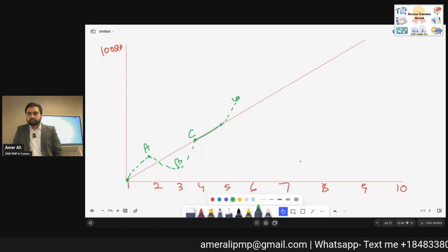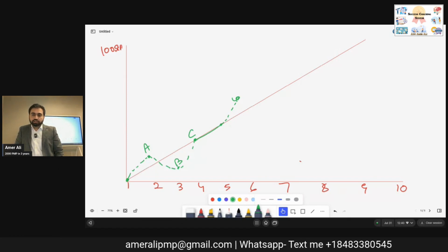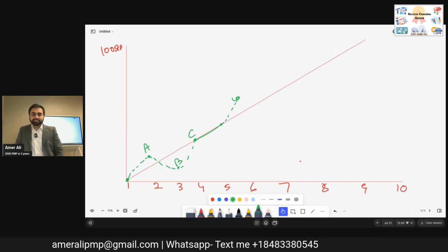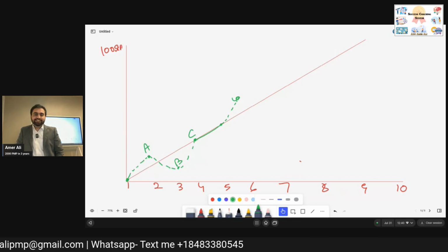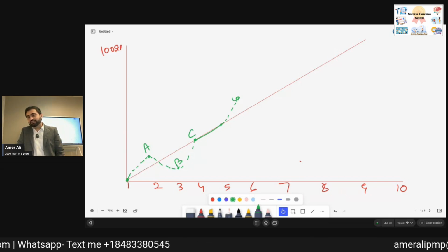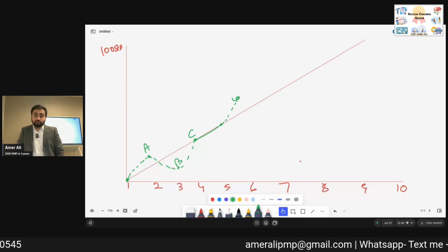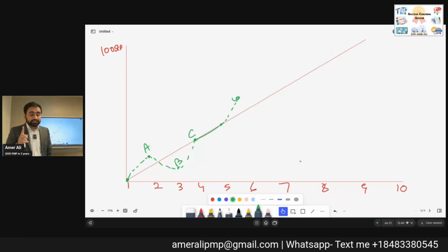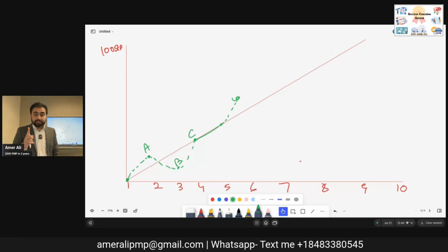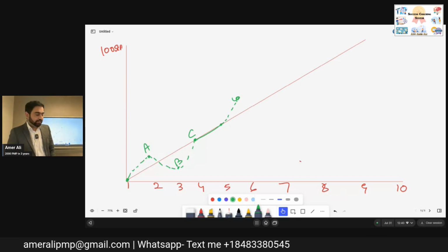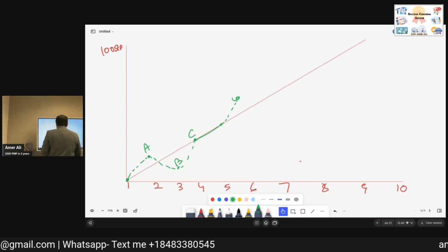Agile does not assume all days are working days; working days for agile are weekdays, Monday to Friday. So that's why when we say a 2 week sprint, it is 10 days. Agile also stresses sustainability. Remember, agile says sustainability. Okay, what does A indicate?